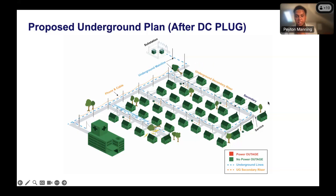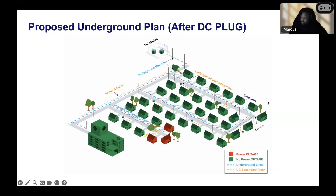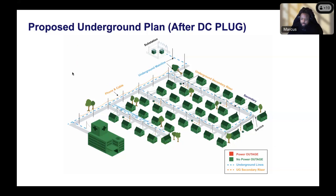Regarding whether Feeder 467 connects to the Connecticut Avenue underground feeder: Connecticut Avenue already has Feeders 467 and 476, both of which are already underground. The new underground feeder will connect to that existing infrastructure through a four-way switch.